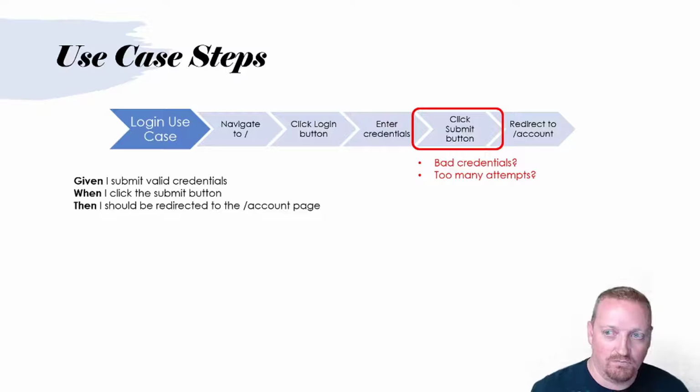And in frameworks like Cucumber or SpecFlow, this given, when, then actually is the test. So I'm not making this up. It's not like just some comparison that I drew out of thin air. It actually is supposed to be a test. And it is the definition of done, essentially. It is when we can pass this given, when, then test, then that means this particular step or this particular story is done. It is ready to go. It is ready to be shipped.